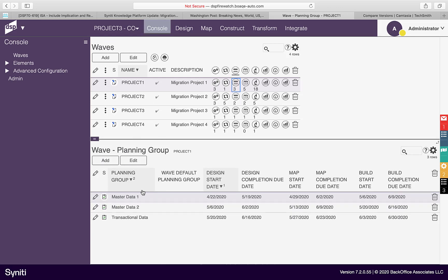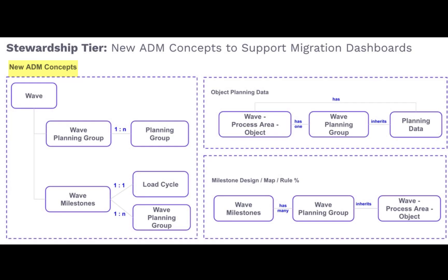Each planning group has target start and completion dates for design, map, and build activities. For more granular tracking of an object status through design, mapping, and build activities, an object can be assigned to a planning group. This allows planning dates from the planning group to be inherited.